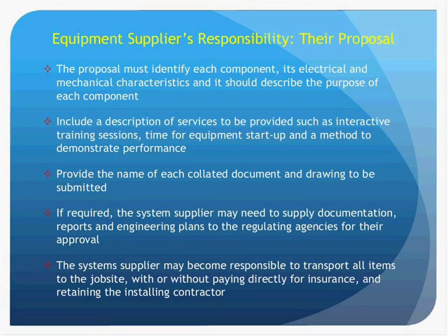The equipment supplier should provide a description of the services to be provided, such as when interactive training sessions are planned, a schedule for equipment startup, and a method to demonstrate acceptable performance. Interactive training, by the way, is the growing concept and best way to ensure that the individuals who operate the equipment, whether it be any kind of purification system, are thoroughly knowledgeable about what happens when they work with or maintain the specific equipment.